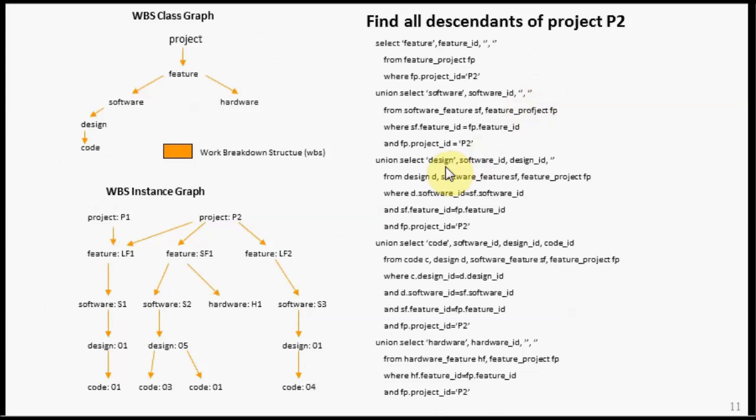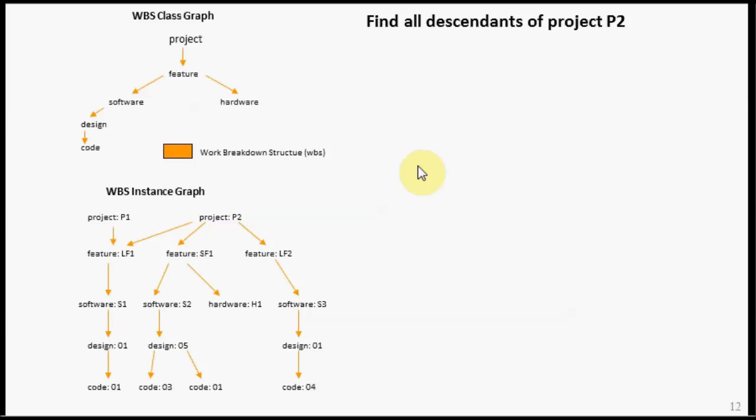Now notice what happens if I were to change my template. If we were to take hardware and tomorrow decide to break this down into smaller chunks of work, what happens to reports of this nature? Well, they break because we've hard-coded the knowledge of the structure of my template. Project managers using our tracking system typically were making process changes on a daily basis. So they were constantly modifying this template. So our set of reports were literally breaking every single day.